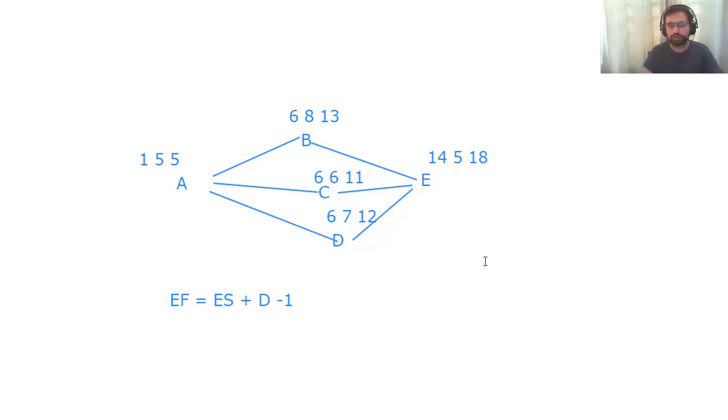But if you want to follow the complete thing or they are asking you for float, so then you have to do backward pass. For backward pass, always remember that late finish of last activity, here in this case is E, late finish is equal to early finish. So we will have here late finish 18. Duration remains the same, 5, 14. And the formula for late start is late start is equal to late finish minus duration plus one.